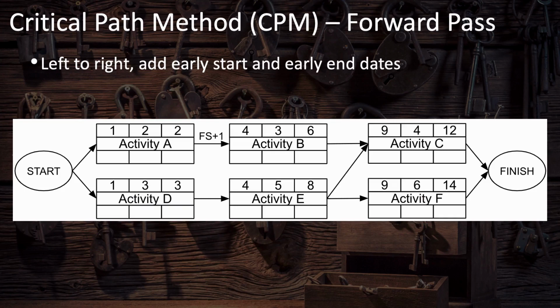Activity C, well, we'll come back to that because it's got multiple dependencies, multiple prerequisites or predecessors. Let's go back over to the left to activity D. It also starts on day 1, lasts 3 days, so it will end at the end of day 3. Activity E starts at the beginning of day 4, lasts 5 days, and so it will end at the end